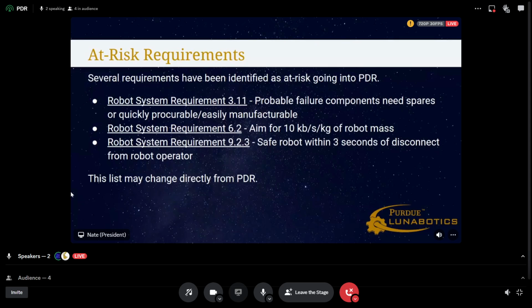Okay. Do you have the cumulative number, like the multiplication of the different risk factors? Like 120 RPM, whatever, or something like that. That was going into CDR for all of the failure modes that we looked at. If the RPM value is over 100, we'd like you to have some sort of plan to try to mitigate that.